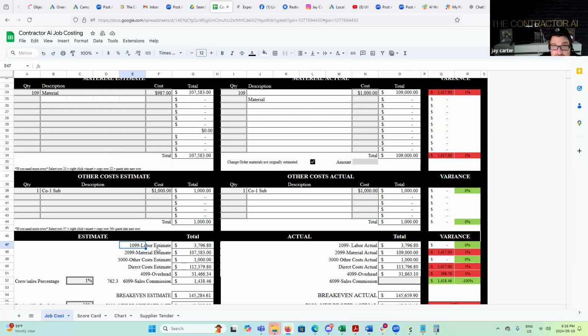Does it go under the other estimates? Yes. And again, I'm gonna give you some rules of thumb that are pretty standard across the states and Canada. If you are using a subcontractor, you are signing a subcontractor agreement up front. That can be a blanket agreement. I do it with my subs, and it basically states they're independent and gives them the rules of working with you. I'll share that with you guys as a resource.